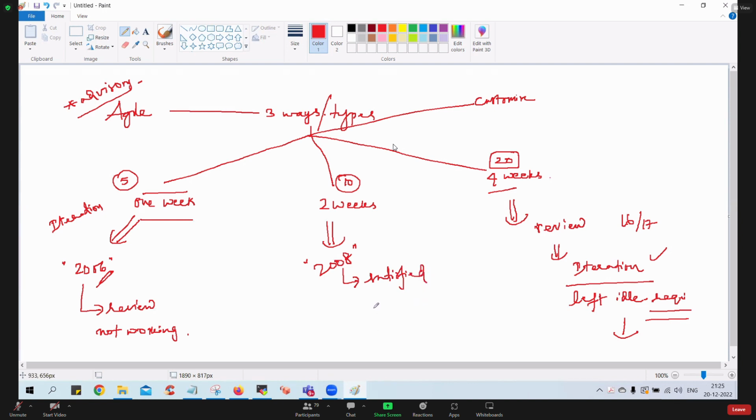So in the 2 weeks model, what happens is we take some items and work for 2 weeks. That is roughly 10 working days, right? Whatever items they finish, they're happy, and whatever is left out moves to the next sprint or next iteration. You got it? This seems to satisfy a lot of companies. It's not great, not bad. So this gets a credit rating of good, you can say. Understood, guys, what I'm talking? Not bad, not good. Okay, most of the companies are satisfied.